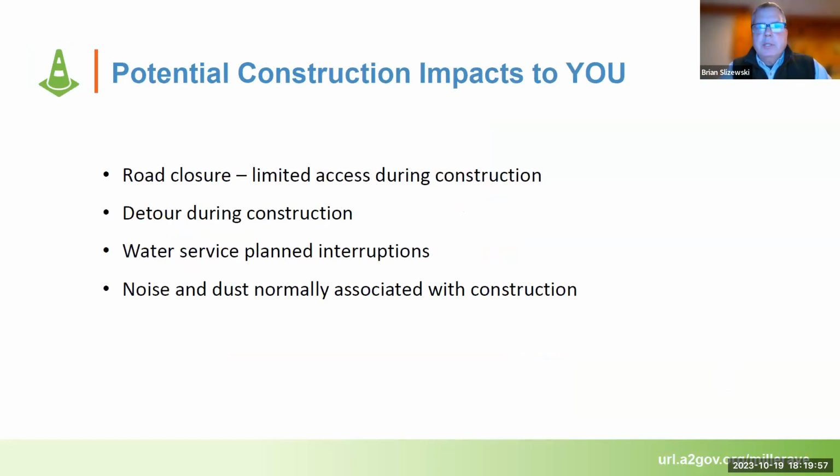Construction impacts. First of all, road closure. Again, in that stretch we're talking about where we're replacing the water main, this is a narrow road. Water main construction actually does take up a fair amount of room, and you can imagine with the construction vehicles and with the trenches, the road essentially will be closed to any through traffic and be detoured.